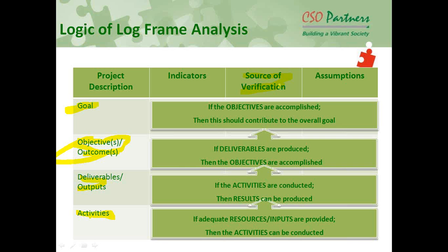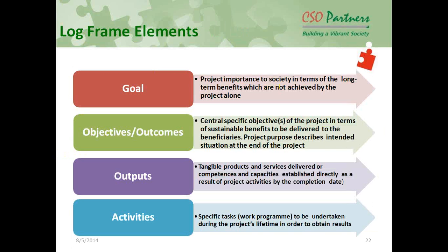Again, if you go back to that force field analysis, you see that we put on the force for and force against. So forces for, if it is higher than forces against, then definitely it's a feasible project. If the forces against is higher than the forces for, then if you can invert some of the forces against to forces for, then you can make it feasible. So how do you factor all these assumptions in your planning? That is really, really important.